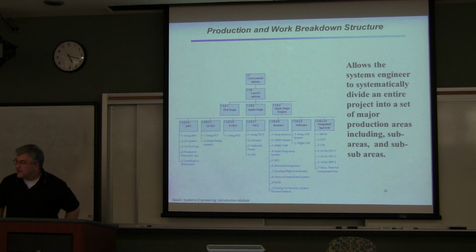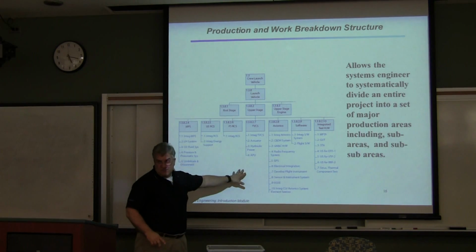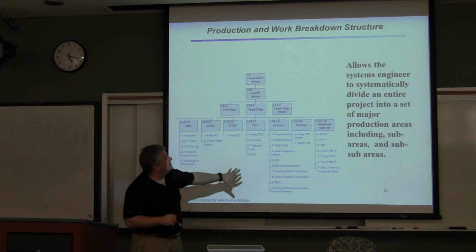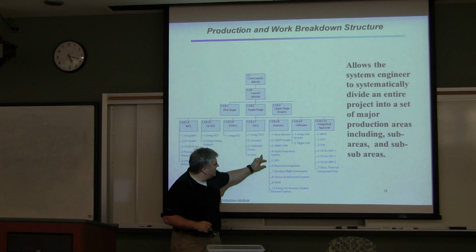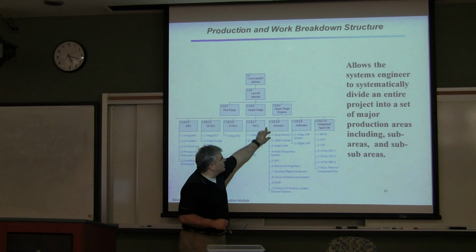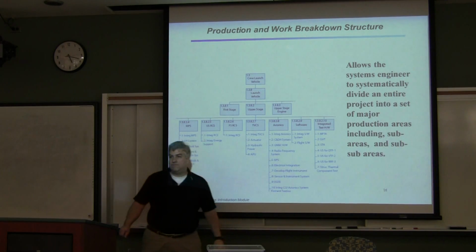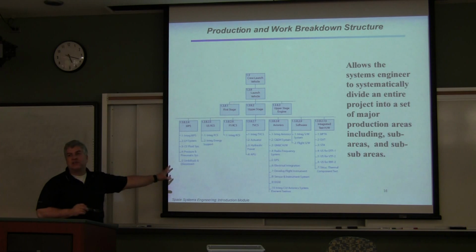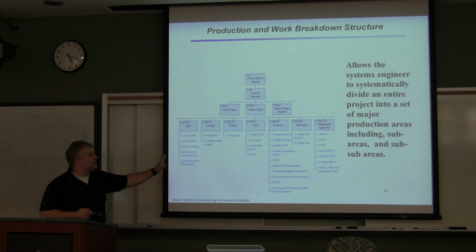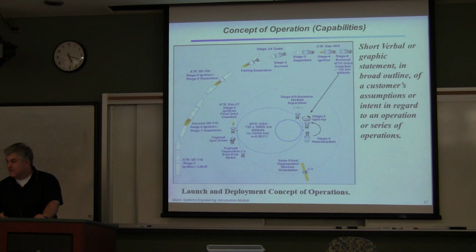So here we were, work breakdown structure. The important thing to note is that this is a great way, hierarchically, to identify what has to be done. Sub-assemblies, and you could expand on every single one of these. Integrated avionics, let's say you expand that into something that might even look all the same. But the nice aspect of this is you can identify how things are to be built, assembled, designed, purchased, delivered, whatever you want.